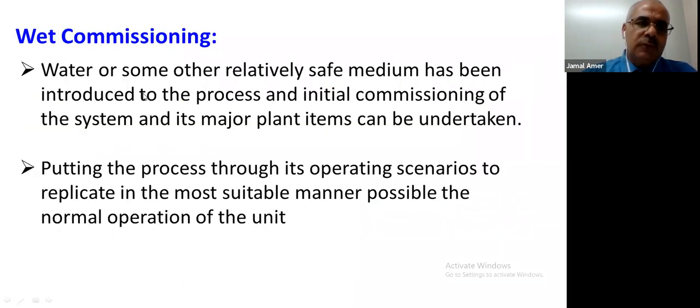What is wet commissioning? Wet commissioning is to introduce some safe fluid, safe media, to the system, but not the fluid which we intend to produce in our facility or to treat in our facility, such as water or nitrogen or air. All this we call wet commissioning.